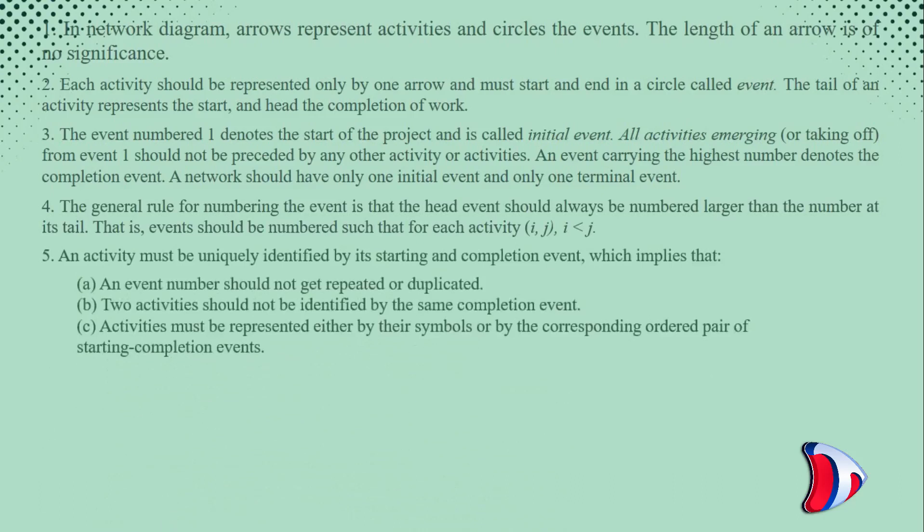An activity must be uniquely identified by its starting and completion event, which implies that an event number should not get repeated or duplicated. Two activities should not be identified by the same completion event. Activities must be represented either by their symbols or by the corresponding ordered pair of starting completion events.